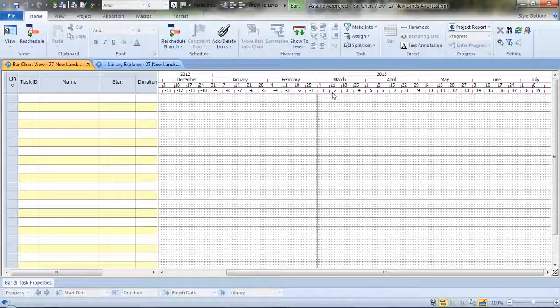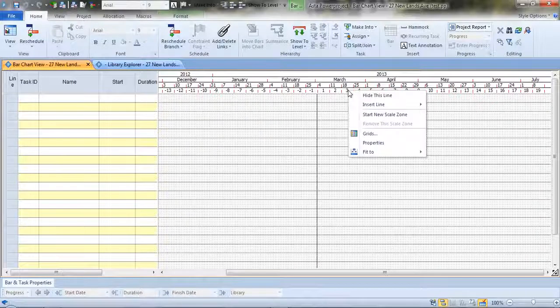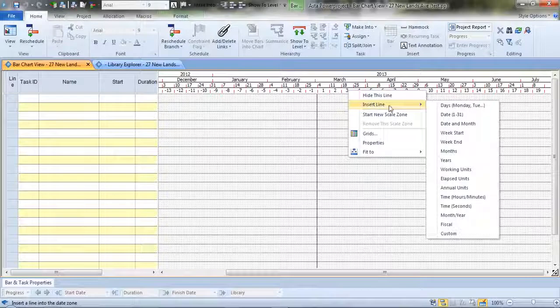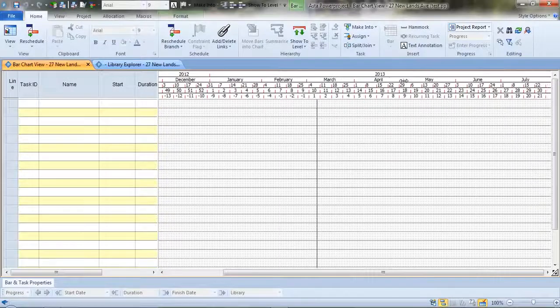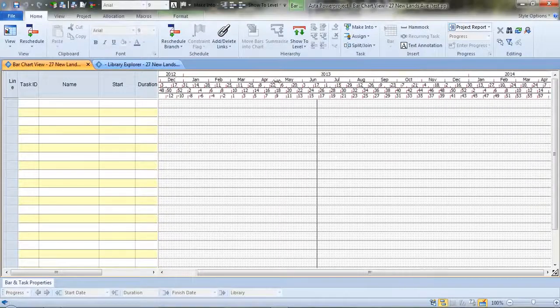At the top of the screen, the date zone, as it's known, is very important, and this one's got 4 different date rows, but we could have up to 10 different rows in this particular area. So here I could put another entry which shows us the week number that I would find in my diary. You change the scale in Power Project by putting the mouse on a tick mark, holding down that tick mark and dragging with the mouse.